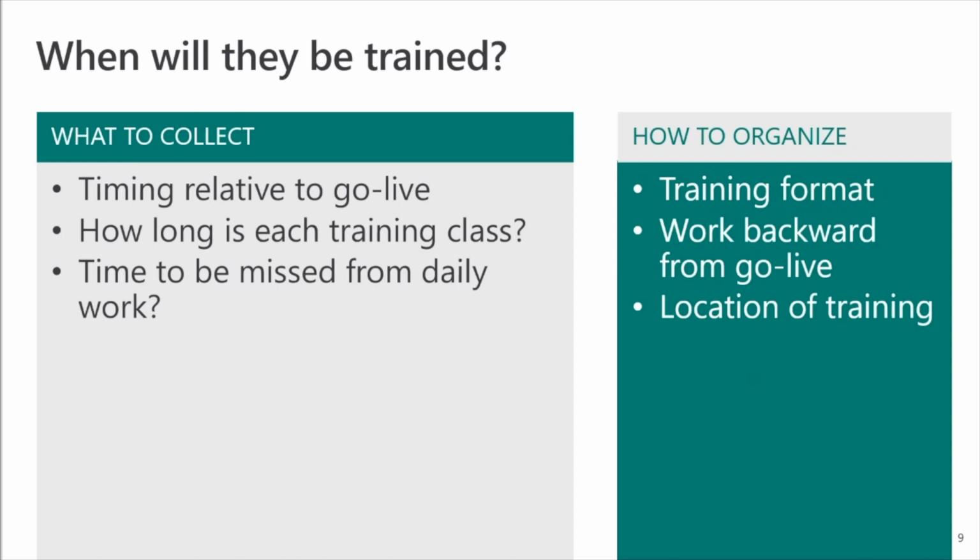So when you're first starting to put the plan together, this will likely be an estimate. And as you get further along in the design process and the planning process, you're going to go back and edit these details, but you're going to want to take a stab, a first draft, at how long each one of these training classes or e-learning courses that we need to convey to the user will be, and use that as a gut check. Like if someone is going to be using the software 8 hours a day and they have 40 different tasks that they need to complete in the software, and you've only scheduled 1 hour of training, that's not